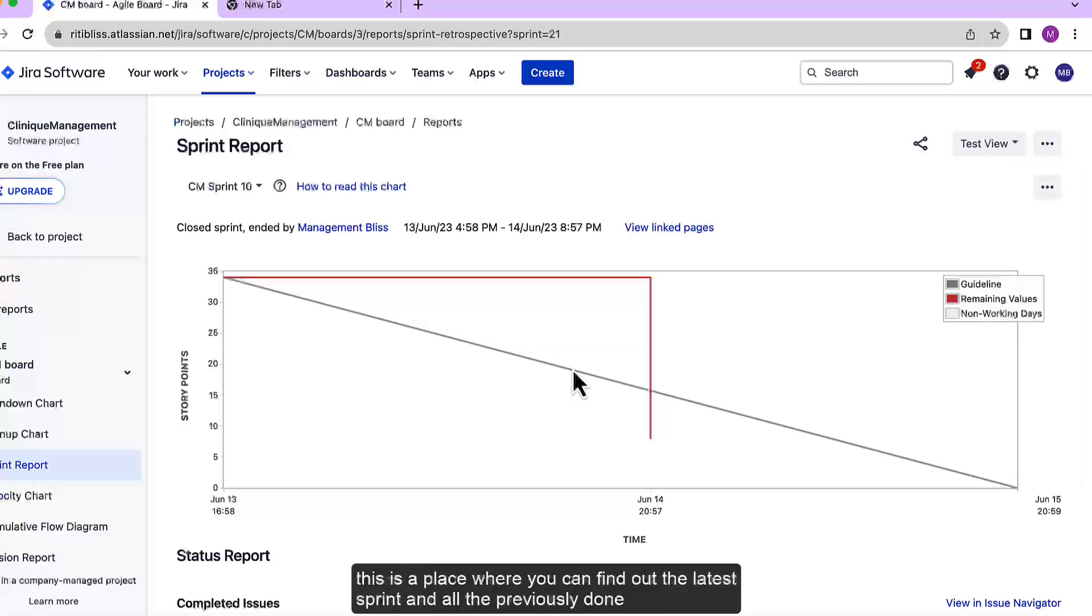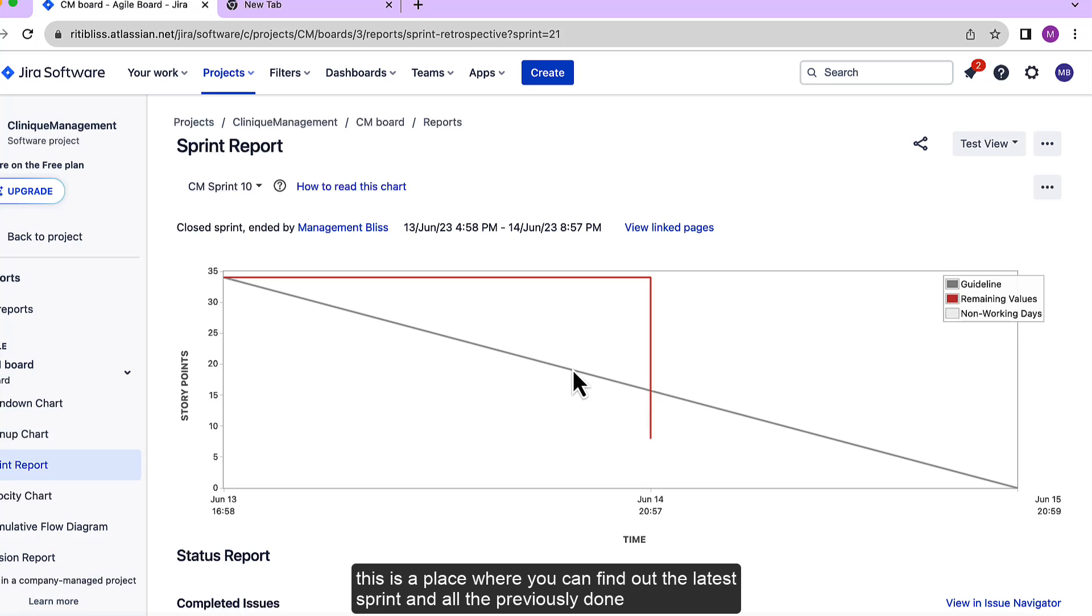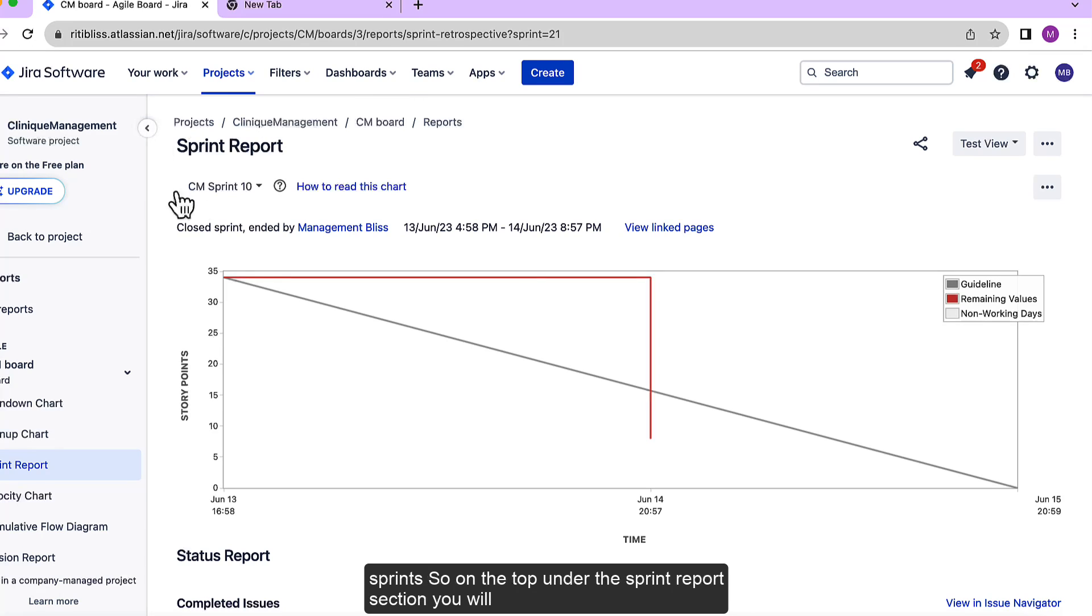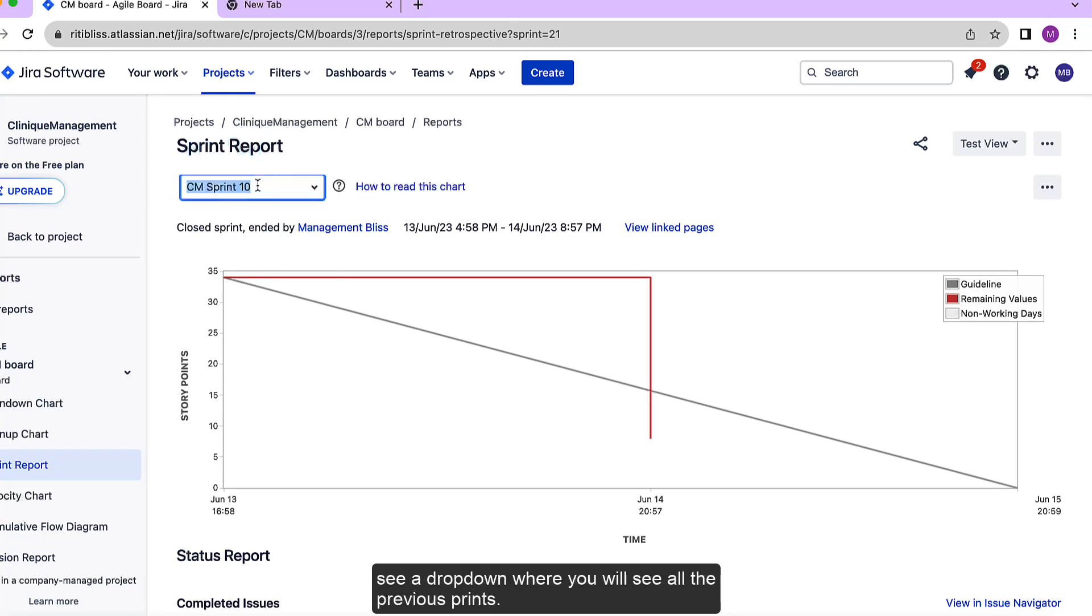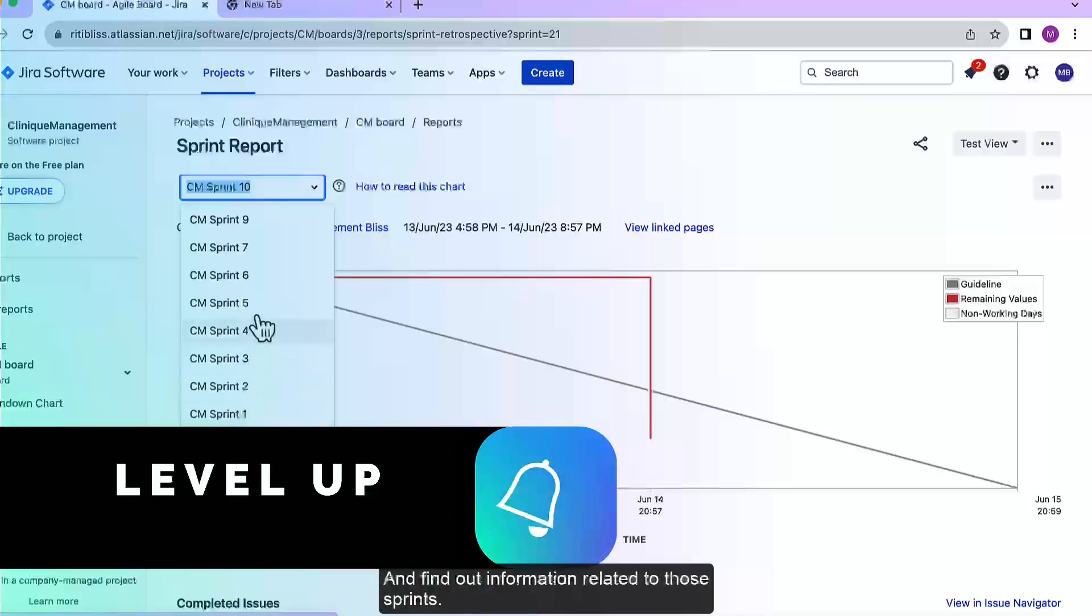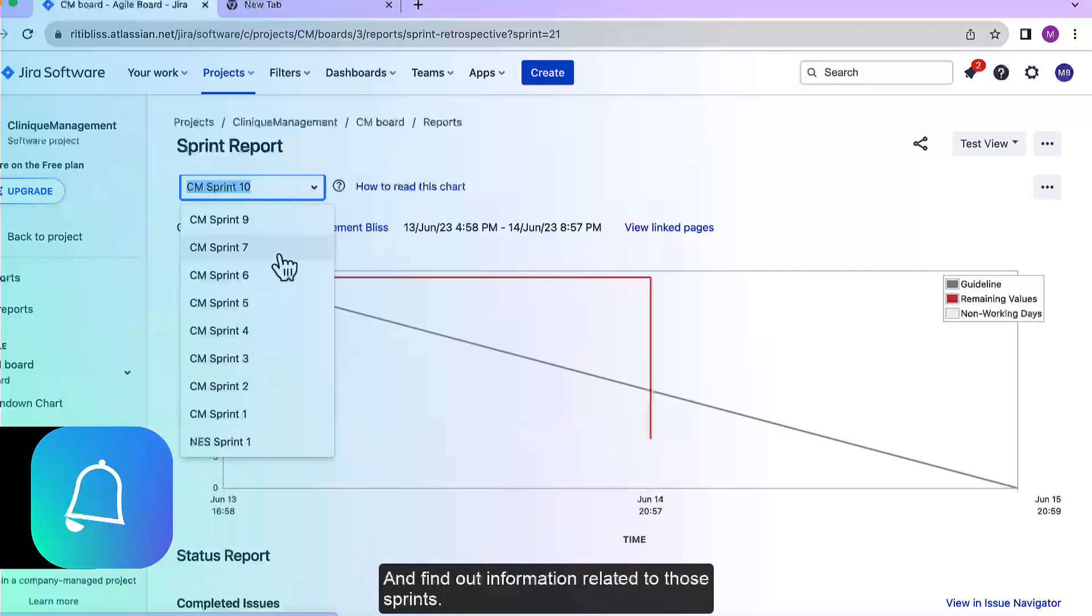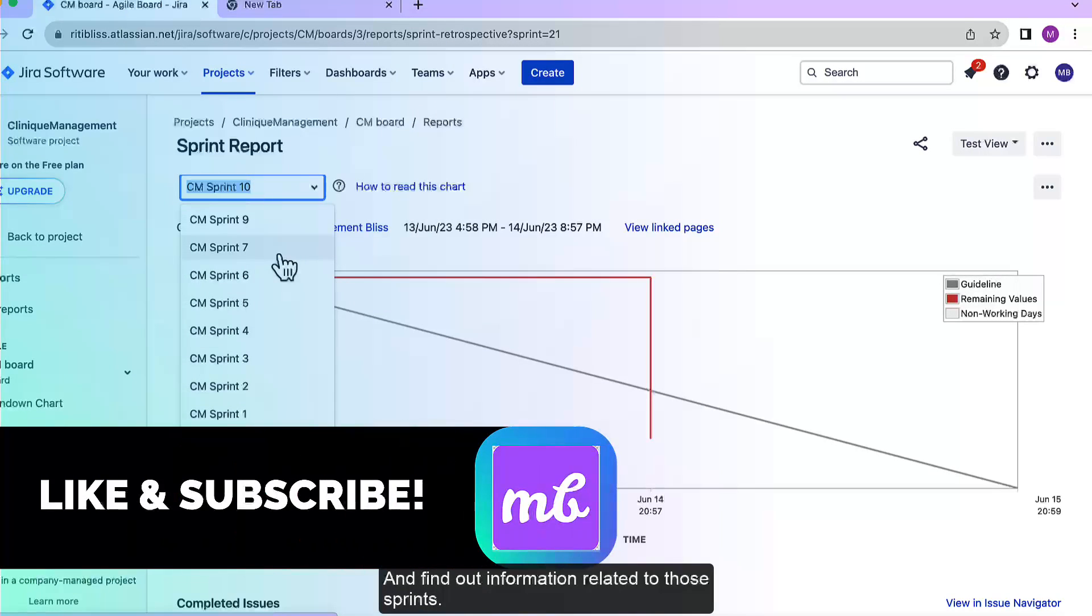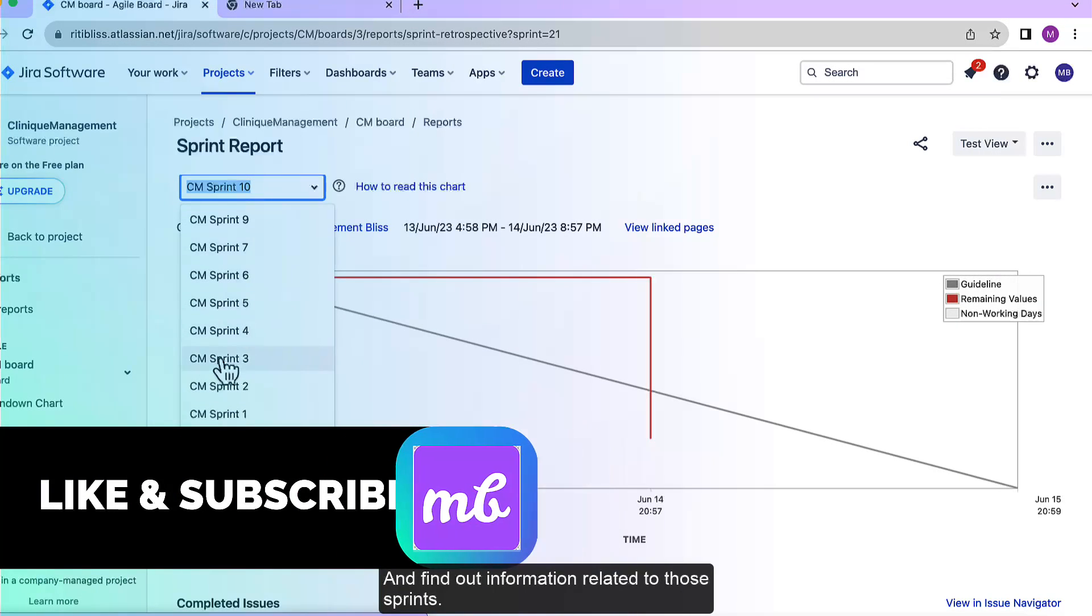And this is a place where you can find out the latest sprint and all the previously done sprints. So on the top under the sprint report section you will see a drop down where you will see all the previous sprints and find out the information related to those sprints.